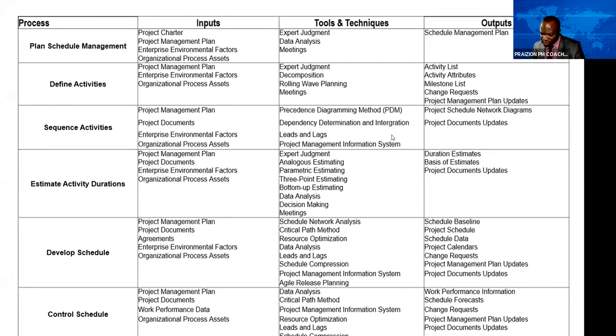Okay. So Jan says, also, do you have to submit a change request before performing resource optimization? That's a very good question. So if you are adjusting the duration and leveling is spreading out your project all over the place and you end up having more schedule, then definitely you need permission before doing that. If you are just doing stuff within the Slack or Float, depending on the organization's policy, you may still need to inform a sponsor or a senior manager. So there's no hard and fast rule of, if you're doing this, should you ask for permission or not? You know, some organizations,